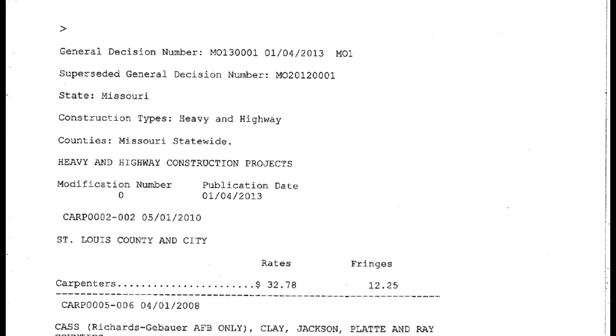When you're going through and doing your estimates, the Means program provides a similar number based upon an average of work that's been done throughout a region. It doesn't always reflect necessarily the prevailing wage, and the wage order is the actual minimum amount that you have to pay.